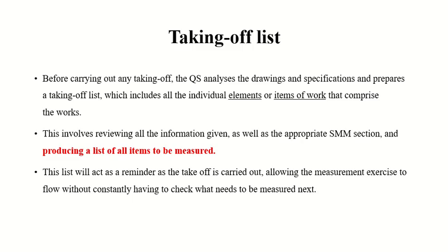Drawings, right? Once you collect the drawings, you should have a look at them. Can I make sense of this? Can I see the numbers? Do I know these numbers? Is anything missing? That is the first thing you do. And once you are satisfied, and I showed you an example in one of the lectures where the specification